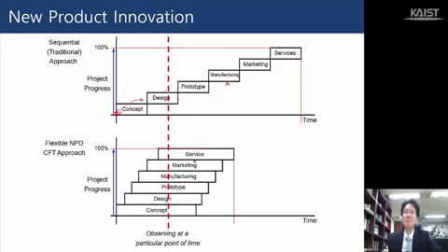So design, recognizing no problem at all, completes its own design, and it releases the design to prototype. And prototype, after receiving the design from the design function, and without knowing what's happening in manufacturing, the prototype people complete the prototype in their own way, and then they deliver the prototype to manufacturing.